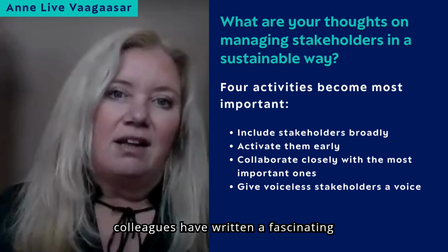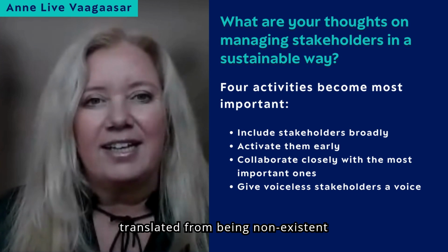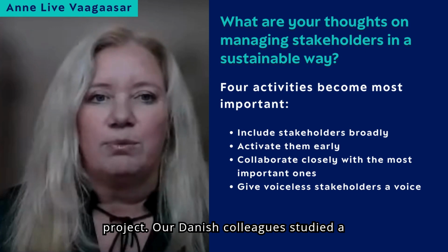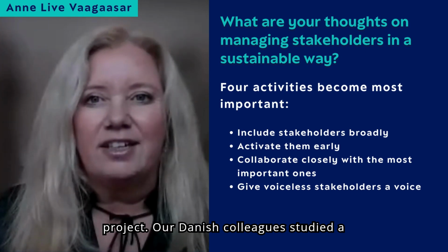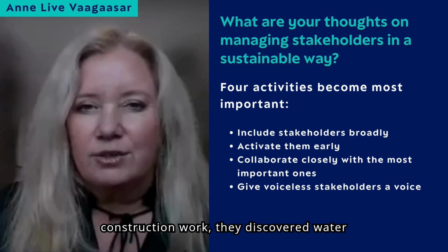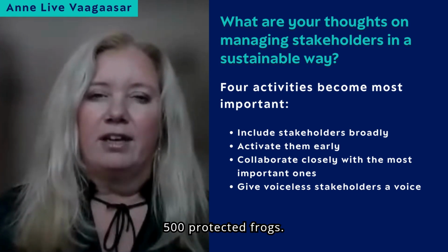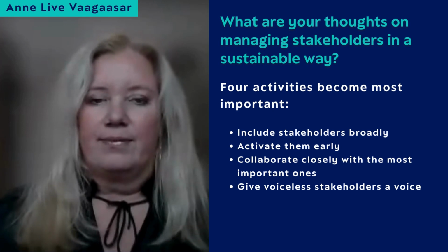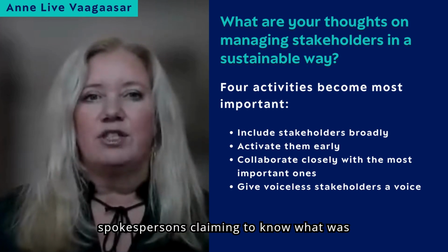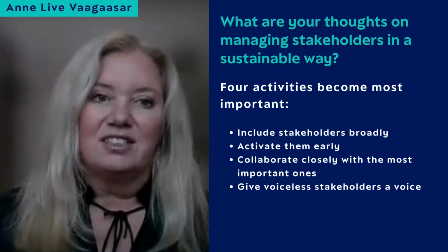Some Danish colleagues have written a fascinating story of how frogs were translated from being non-existent into strategic actors in a construction project. Our Danish colleagues studied a firm that bought land to develop residences. As they were ready to start construction work, they discovered waterholes on the site inhabited by more than 500 protected frogs. The project came to a halt as the frogs became a contested object with several spokespersons claiming to know what was in the frogs' best interests.